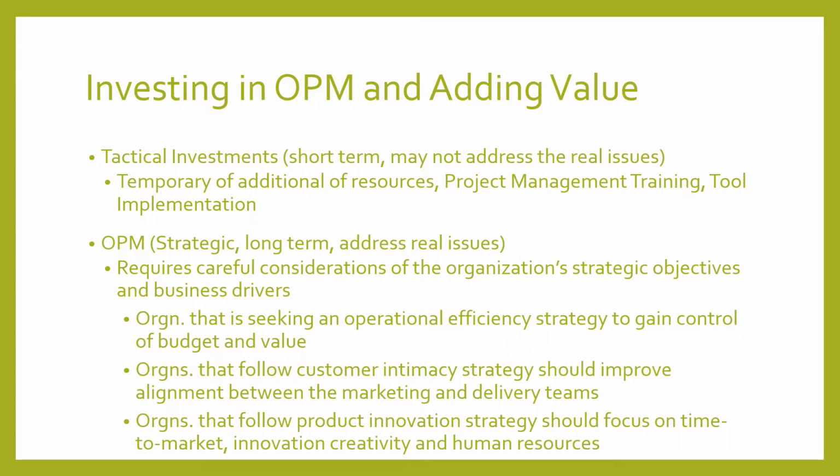There are two types of investments you can make. One is tactical investments, which are very short term and may not address the real issues. Tactical investments like adding temporary resources, providing project management training, and tool implementations. These are all tactical investments which can address short-term issues. But OPM is very strategic and long-term, and it will address the real issues.